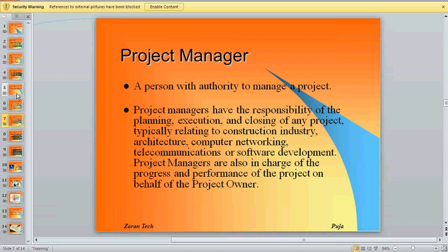Exactly right. 40,000. Okay, $100 per hour times 480. So that is the cost. So anytime you manage your time and resources, you ultimately know your cost as well. If you add up the cost, it should not exceed the total budget that was allocated to this project. And this is what a project manager does.